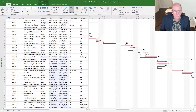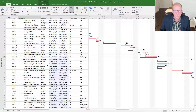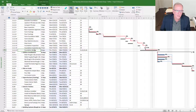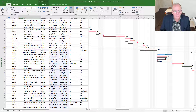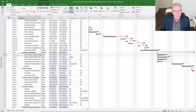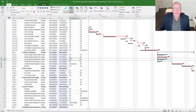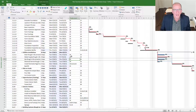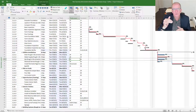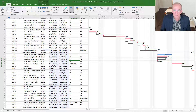This is how you manage buffers in Microsoft Project using the transparent method. The other way is to put a lag on an activity — instead of inserting a separate row as a Foundation Buffer, you could have Foundation Inspection Approved with a four-day lag to the successor activities, giving that extra time without a separate line item that says 'buffer.' Some people like that because the client won't ask about it. But I think you're better to be transparent at the beginning: this is what we're doing, this is how we've scheduled it, this is our allocation for extra room, and beyond that we're always tracking and documenting.